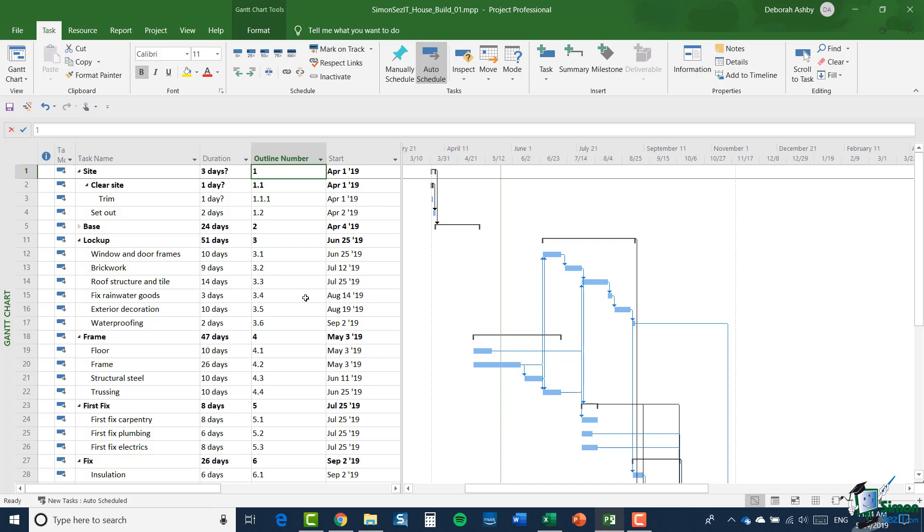And the outline numbers that are assigned to the tasks follow the same structure of the tasks themselves. So for instance, here we have summary tasks site, base, lockup, and their outline numbers are 1, 2, 3. And within each of those summary tasks, the next level of task has a dot and then the second part of the outline number.